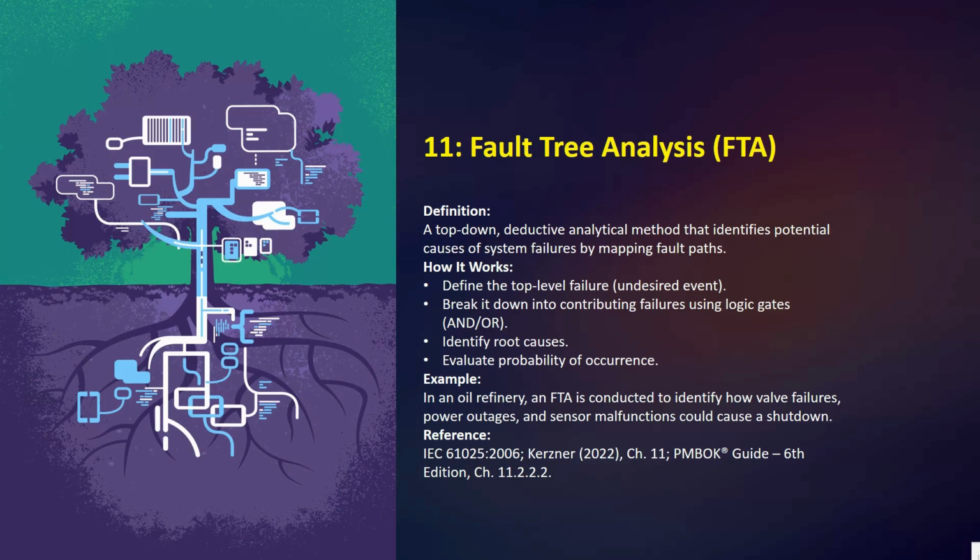Okay, so here you can see under definition, a top-down, deductive and analytical method that identifies the potential causes of system failures by mapping fault paths. So how does it work? Define the top level failure. Then break it down into contributing failures using logic gates. Then identify the root cause, and evaluate the probability of occurrence.